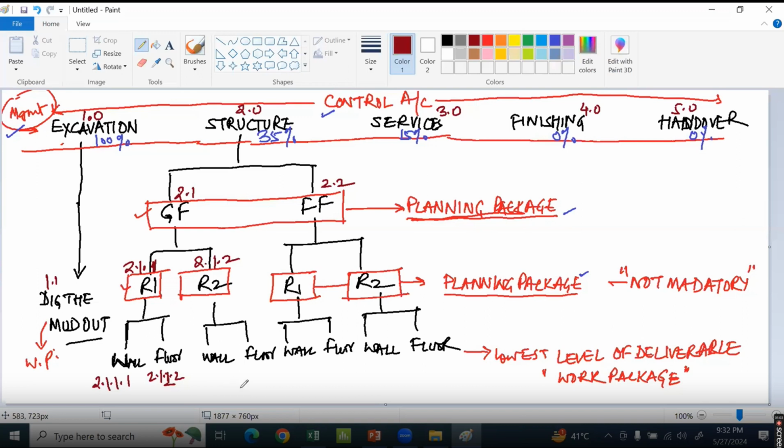So you can structure this, and you don't write the labels here; you put them in the structure. This is called the WBS code. The WBS code is written so that no code is duplicated. Each work package will be aligned to only one control account. You will not see the same code repeating somewhere else. Each code is unique and rolls up to one control account. These WBS codes are assigned as per the code of accounts, which simply means that every work package will only align to one control account. So you'll not see these codes duplicated anywhere.